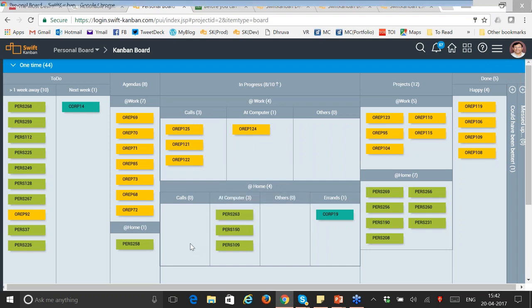So I have two value streams which are actually modeled on one swim lane, and if you're familiar with how cumulative flow diagrams work, which are essentially stacked charts, then that logic doesn't apply correctly when you plot a cumulative flow diagram for something like this. So I just wanted to leave that note of caution when you're building and mapping your value streams: avoid creating parallel value streams within the same swim lane.